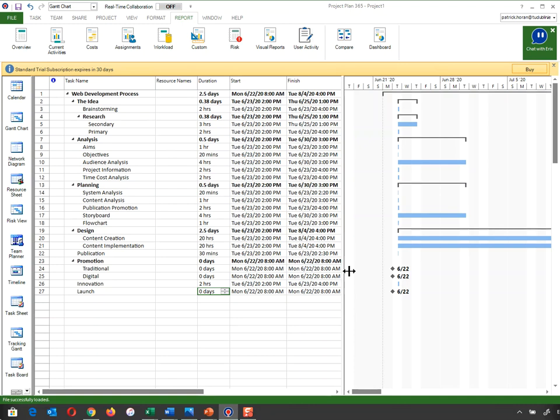Would everyone agree that in order to have a glass of water, I have got to turn on the water before I put the glass underneath it? And I've got to fill the glass before I switch off the tap. So it all has to be done in a certain order, okay?